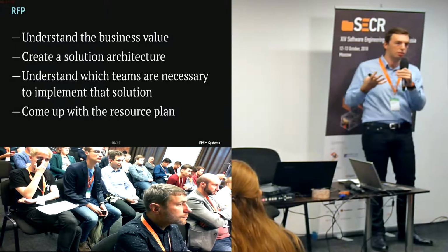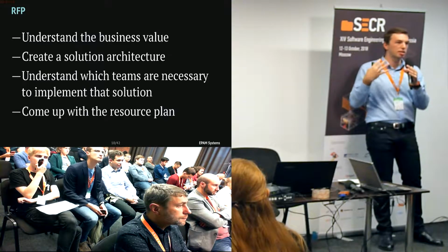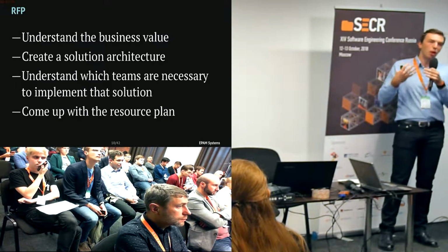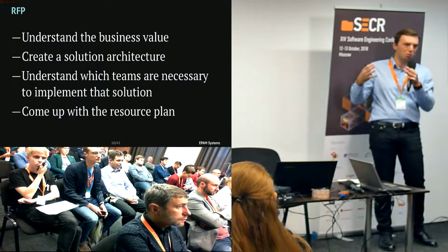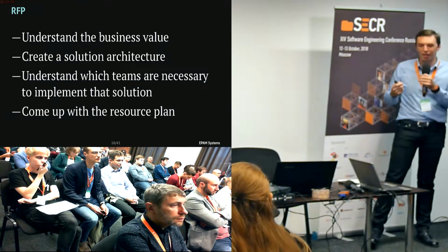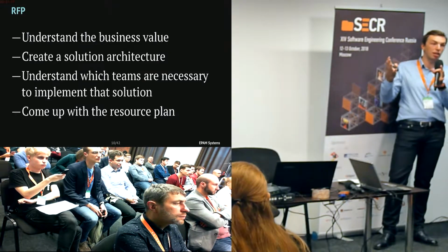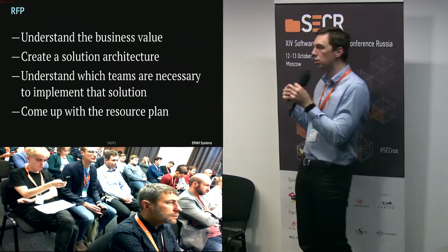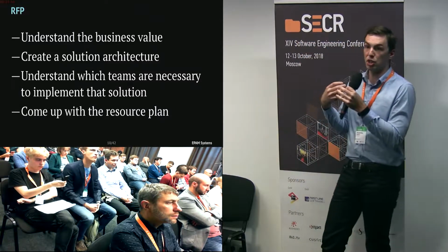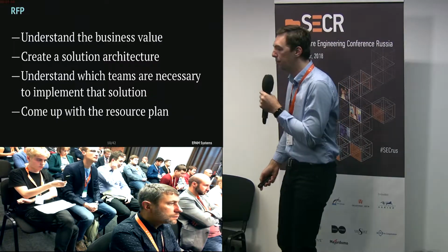Because if you're a software services company, like EPAM, what you sell is the time of your engineers. So we want to position ourselves like a software services, but basically we sell the time of our people, right? So when you have the resource plan, you know the time and money you need to create and implement that solution, and this is the information that the customer wants to know, right? So this is the answer to the request for proposal.